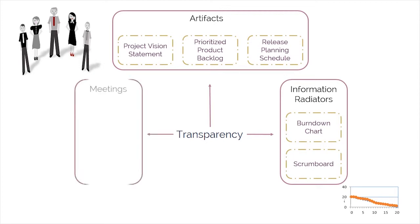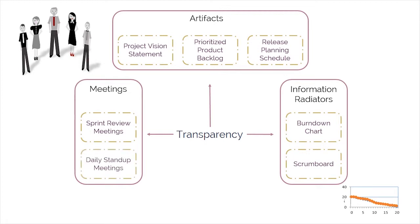Transparency is further supported by daily stand-up meetings conducted during the conduct daily stand-up process, in which all team members report what they've done the previous day, what they plan to do today, and any problems preventing them from completing their tasks in the current sprint.